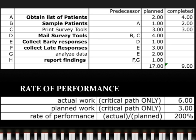Although nine weeks of work have technically been completed, we are only concerned with the critical path, listed in bold. Therefore, six weeks is the actual work time. The planned work time is three weeks. The rate of performance is a percent ratio of actual to planned work time. In this case, rate of performance is 200%.